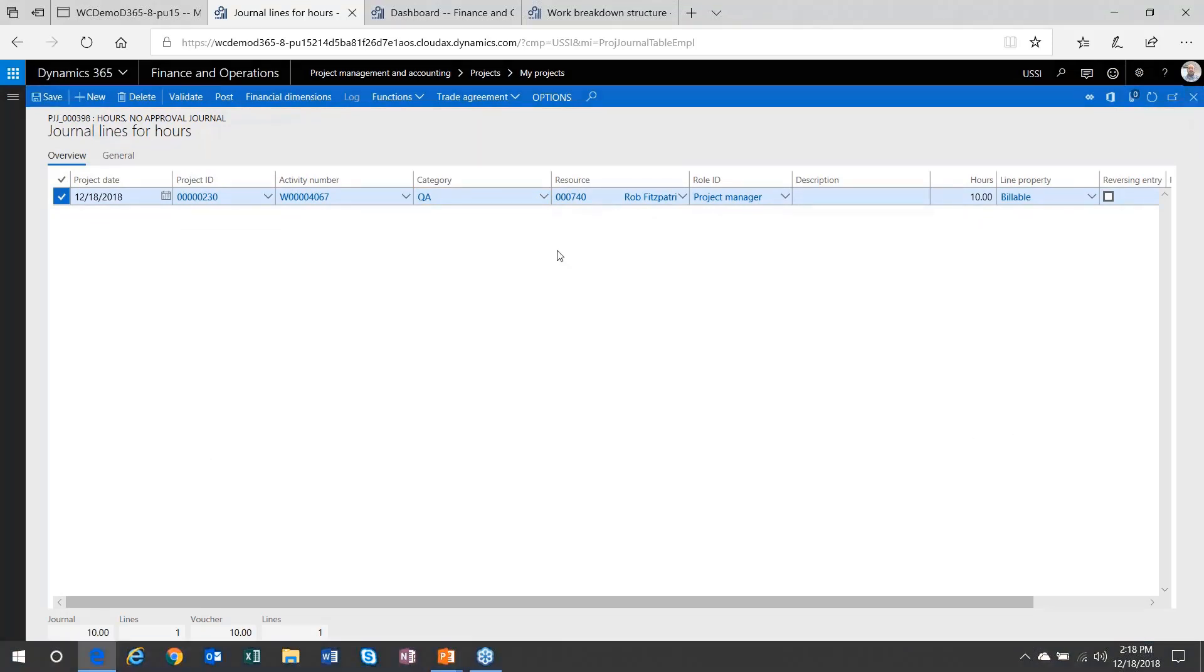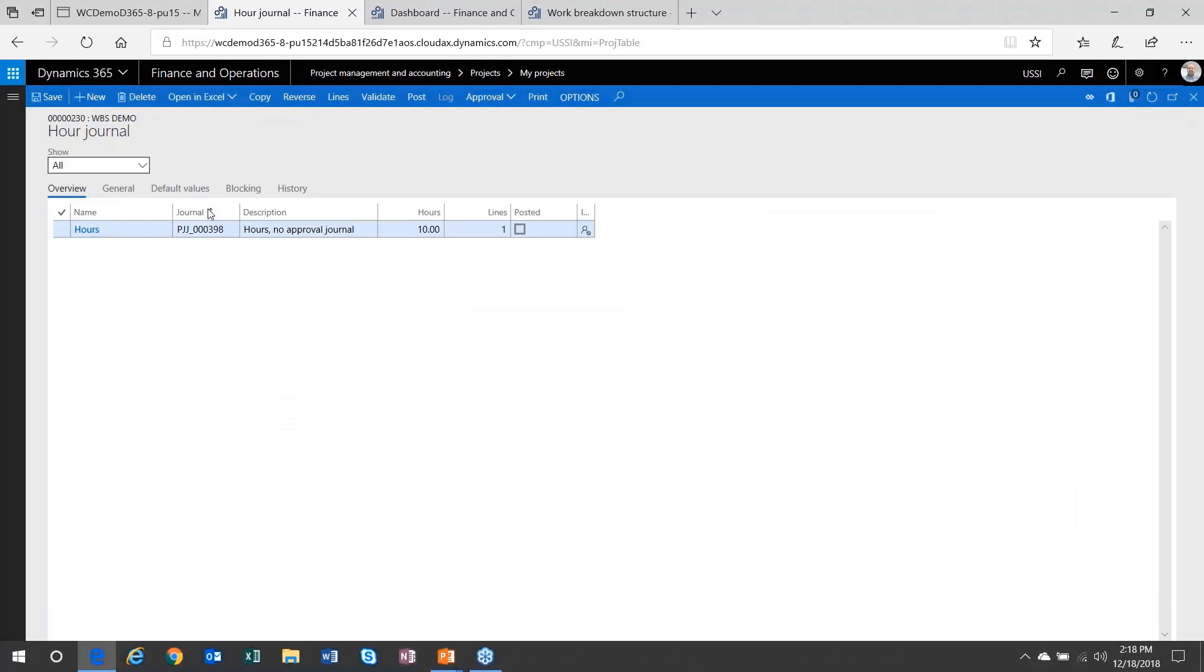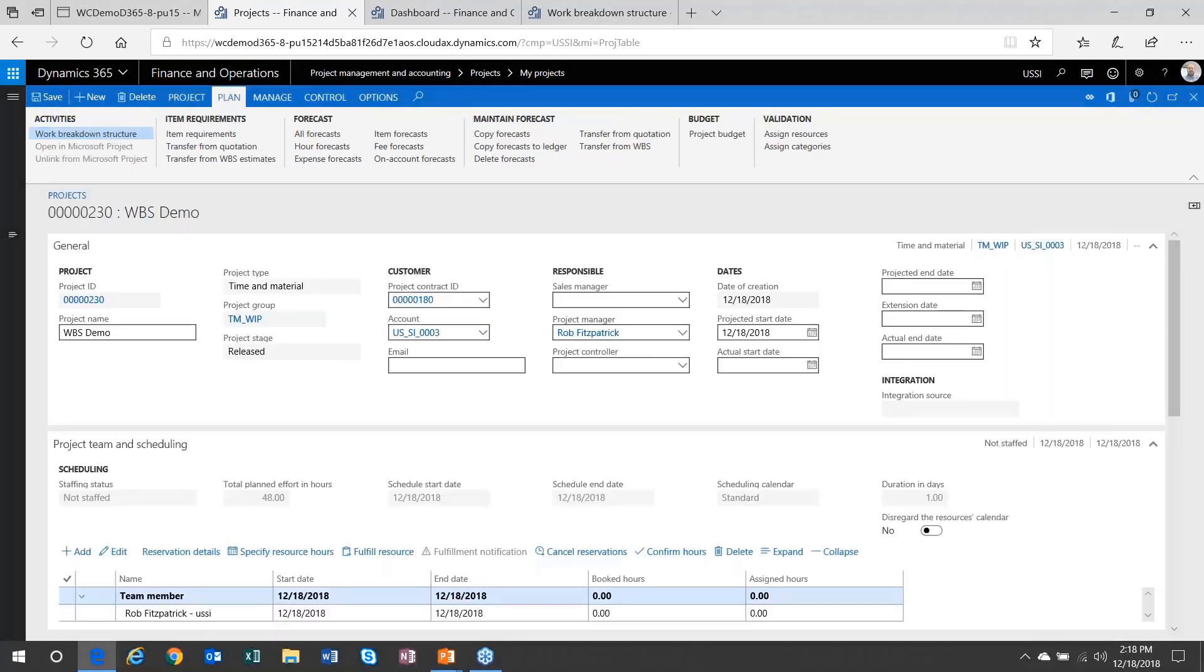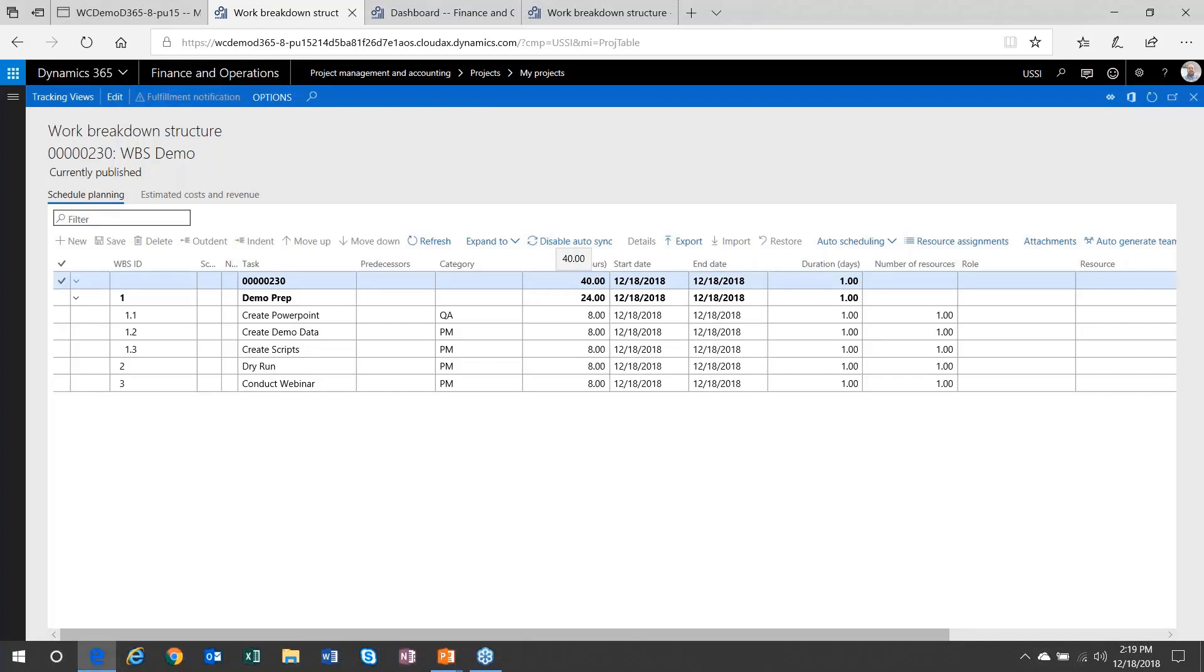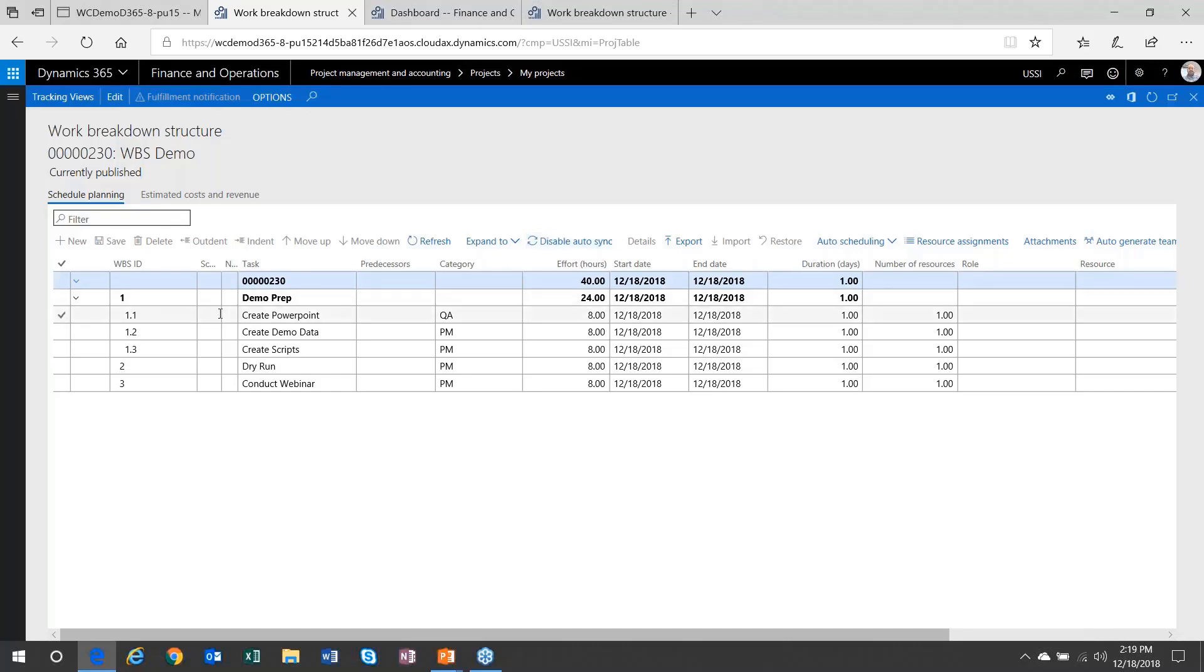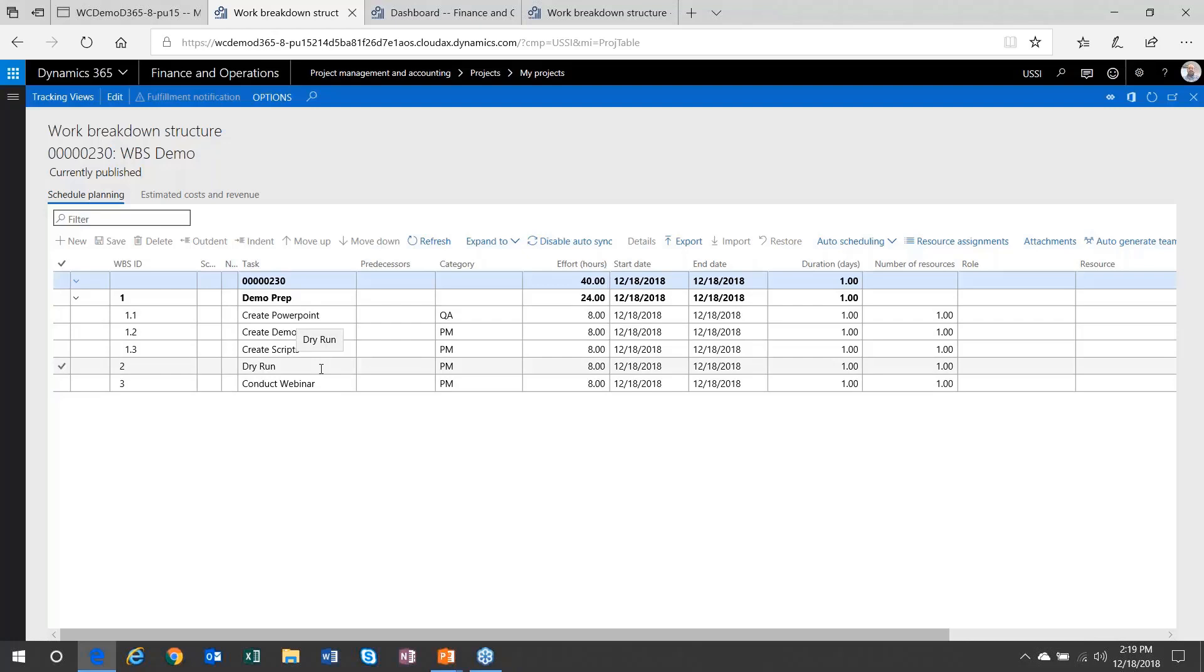I just want to head back out to my work breakdown structure. Basically, what I did here with the work breakdown structure was just set up a way to capture tasks on my project and organize tasks, organize costs and hours as they come in. I didn't touch any of the scheduling functionality of the work breakdown structure. I didn't assign any resources to it. But you don't need to if you don't want to in the system. When implementing it, you really decide what you want to use the work breakdown structure for. If you want to get down into scheduling and resource management, all the functionality exists out here. But what I did here was basically set up a very simple cost breakdown structure. If I just want to manage this project by these tasks and capture transactions and figure out my costs for each one of these tasks, that's completely doable within the system just by setting up your task structure and requiring these activities on the project transaction.